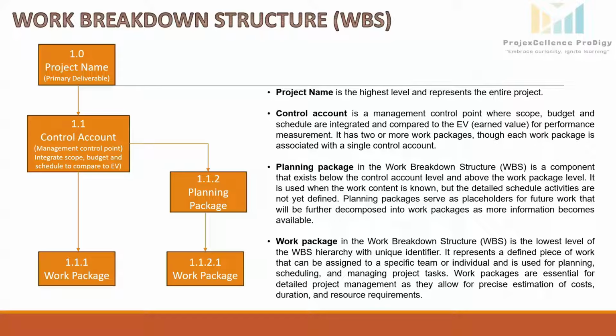Planning packages are used when we know what work needs to be done, but the detailed schedule, activities, tasks, or steps required to complete the work are not yet fully defined. So these planning packages serve as a placeholder for the future work that needs more definition and breakdown. Once more details are available for this layer, the planning package will be further broken down into the specific work package like this here.